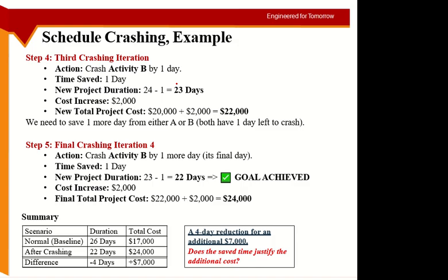critical paths here, and you are not having any activity which has a different per day cost. A and B both have the same per day cost. So if somebody did reduce B by 2 days and A by 1 day, or the other way around, 2 for A and 1 for B, both of them will achieve the same results. So it doesn't matter in the end.